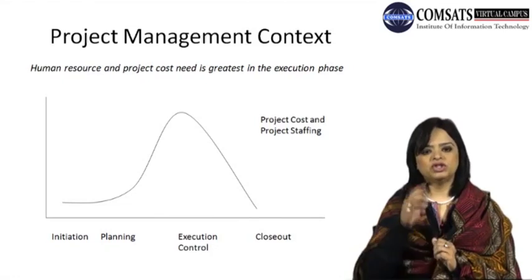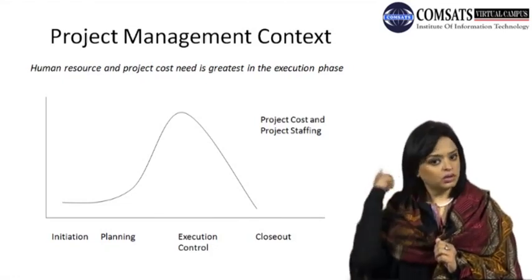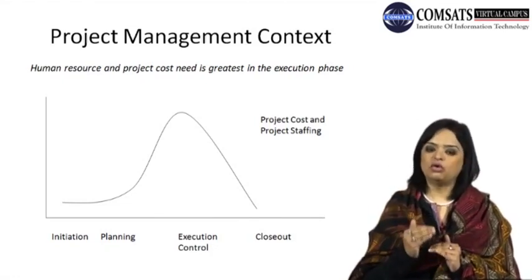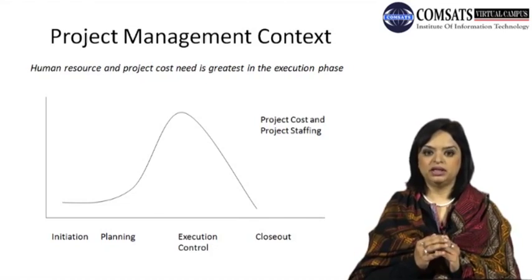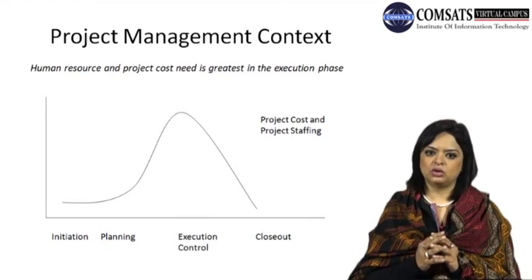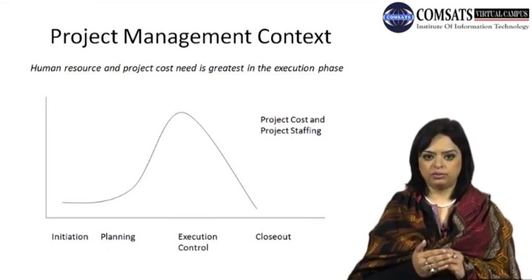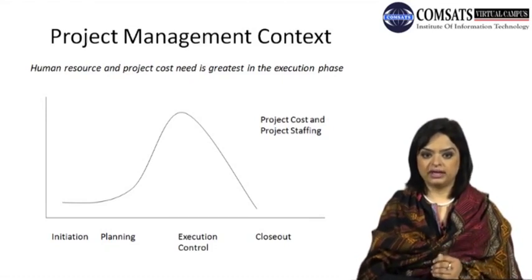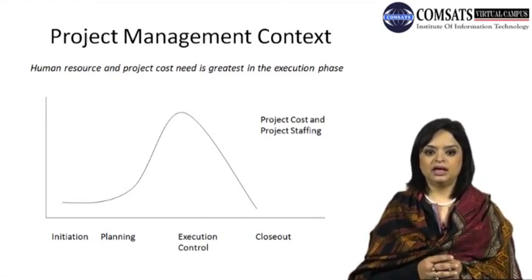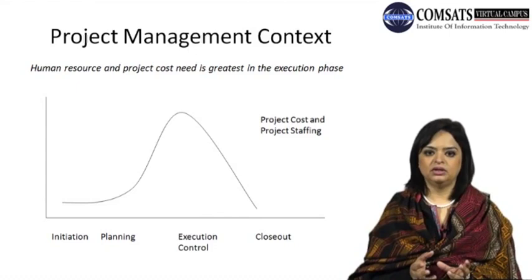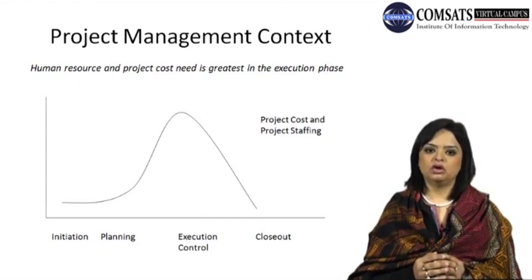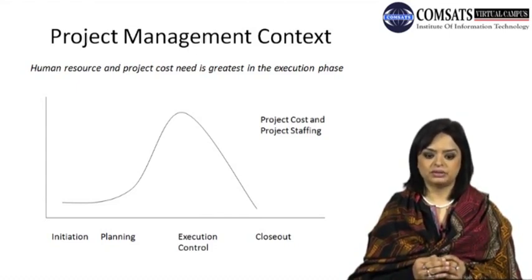One thing that we as project managers tend to ignore is listing of all the activities that need to be done in the closure phase. And the issue arises later on when everybody is in a hurry to move on to different projects, move on to different activities, and there is nobody left behind for successful execution of activities in the closure phase.